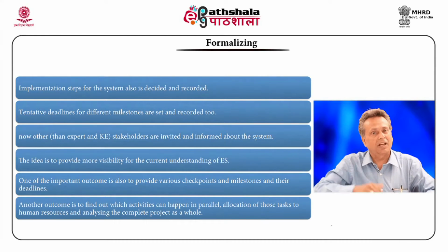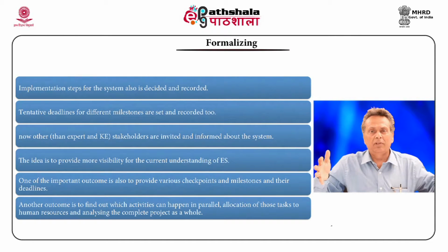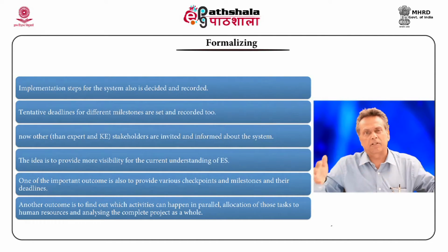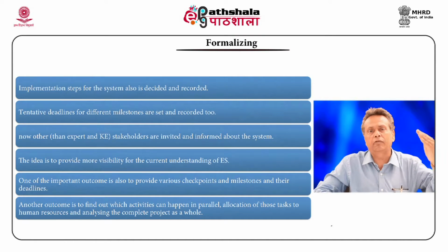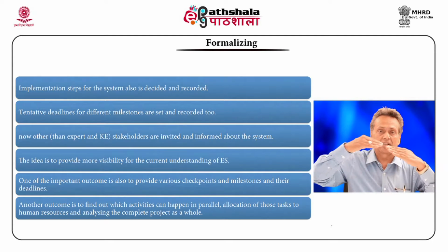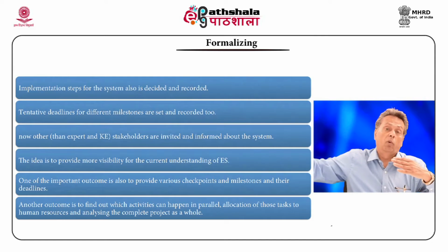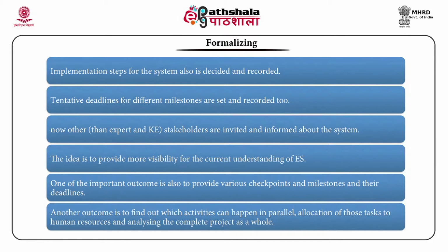It's quite similar to the plan space planning which we talked about long back. So PERT and CPM charts will tell you exactly what happens if one task is delayed. Will the next task be delayed? If this task is a prerequisite, then the next one will have to be delayed. If it is not, if it can run in parallel, you can start. That is also something that we are going to discuss here.